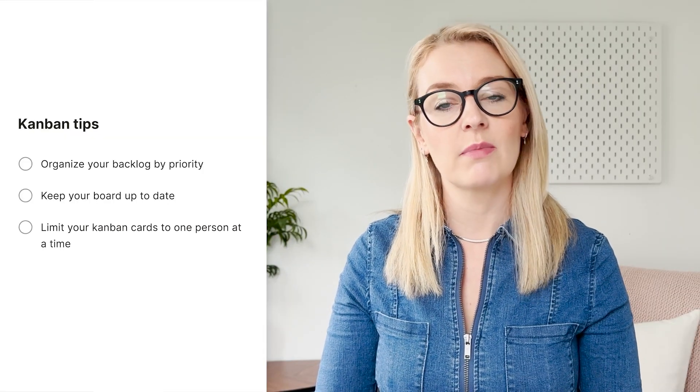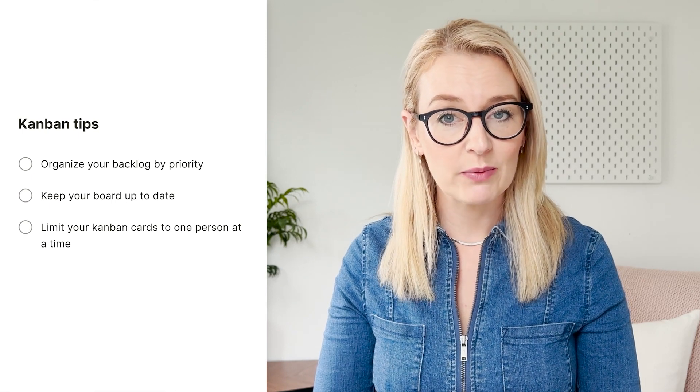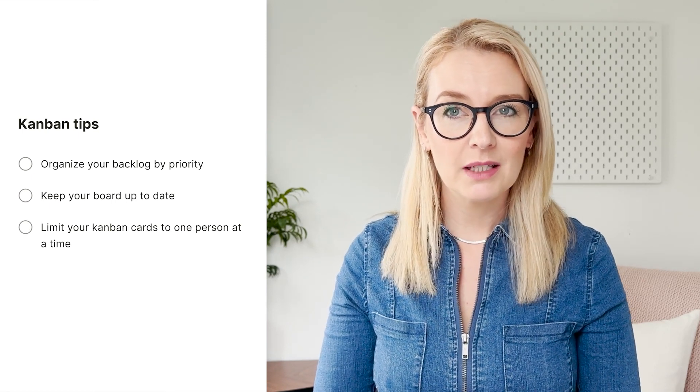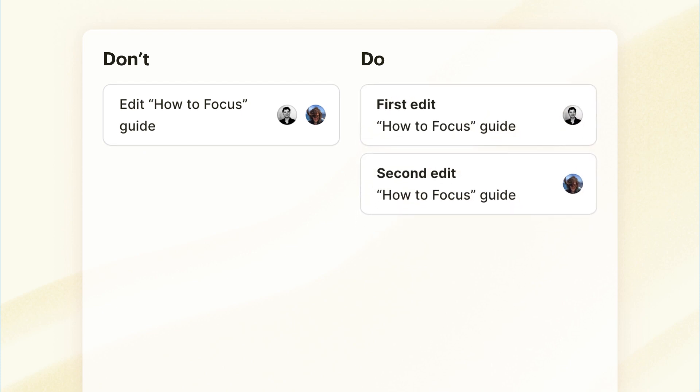A weekly review would probably be helpful — we are going to create a full video on that soon, however in the meantime I'll link a helpful article in the description box below. Limit your Kanban cards to one person at a time. If you have two people on a card it can be confusing as to who's responsible for moving it forward. It's better to break tasks down into smaller steps and have cards allocated to each person responsible for that part of the process.